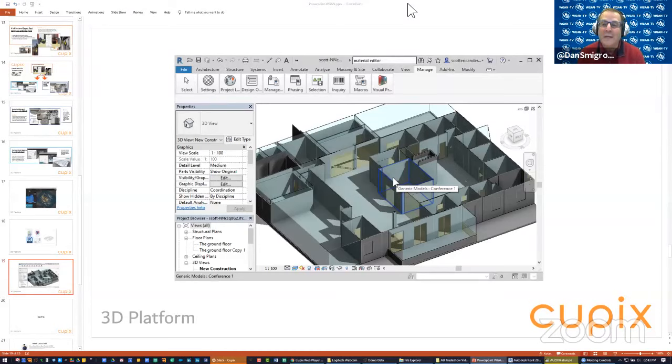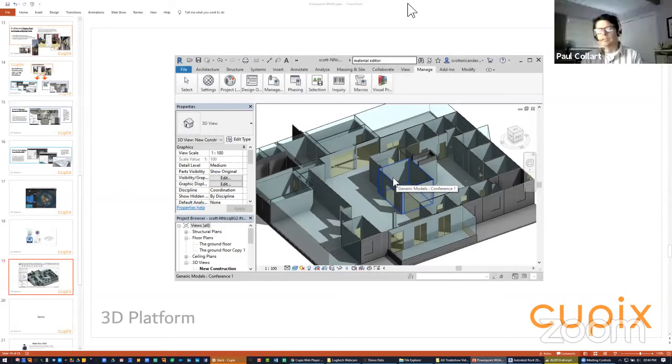The accuracy is not good enough for deciding, we're going to go buy a window, is it going to fit? But the good news is, in this space, correct me if I'm wrong, any subcontractor that's quoting on a project, and we're past the quote, they're actually ready to cut glass, they're going to come out and measure the windows. And that's going to be true for every trade. Scott, Paul, do you want to correct me?